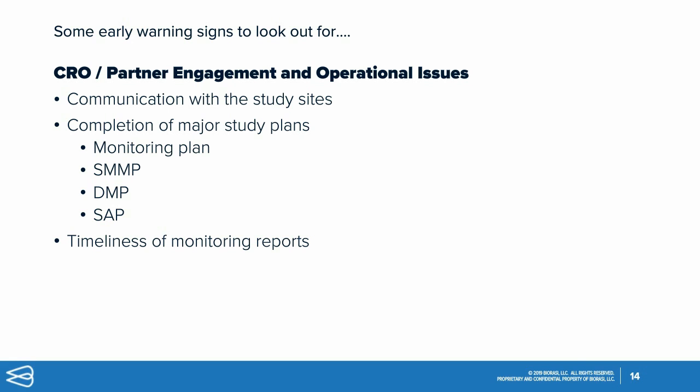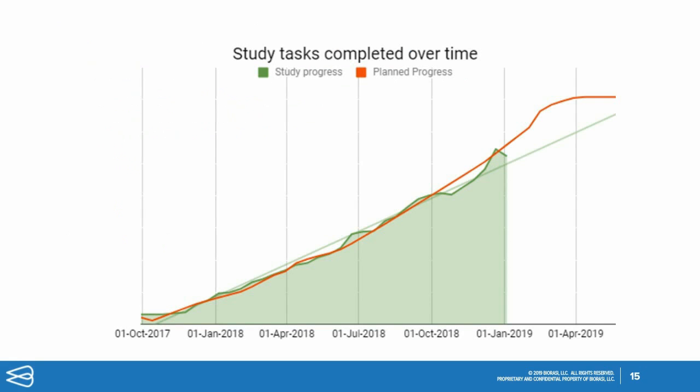Absolutely. This is actually an example of what we do at Biorasi to help keep ourselves on track with all those deliverables that I mentioned that don't get a lot of limelight. We track all of the study tasks completed over time because, as we all know, a lot of times in drug development, any task can be 90% completed in a day, but then the other 10% takes 3 weeks. So it's really important that we are knocking things off the list. This is just one way that we track overall completion of study tasks and make sure we're always ahead of the curve in getting these studies done and not leaving tasks undone, no matter how critical or non-critical they seem to be.